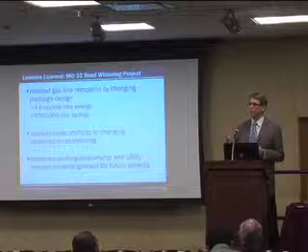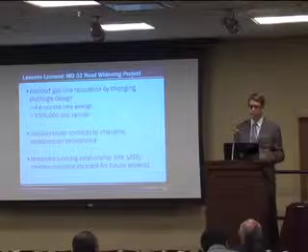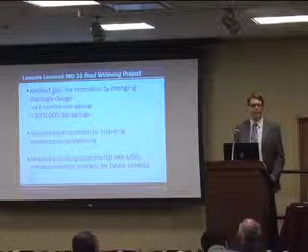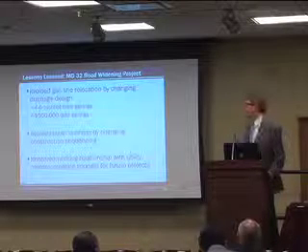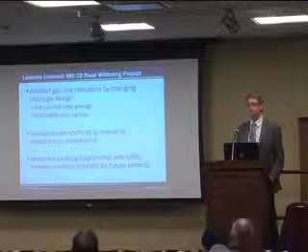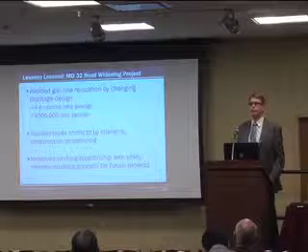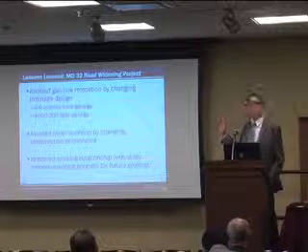So they involved the gas company, who wasn't aware of the project even. But by coordinating with the gas company and figuring out an innovative solution, they said we easily saved 4 to 6 months just on this little small project that would have cost a huge delay. And we also saved the gas company about $500,000 relocating this. This is basically the major finding.